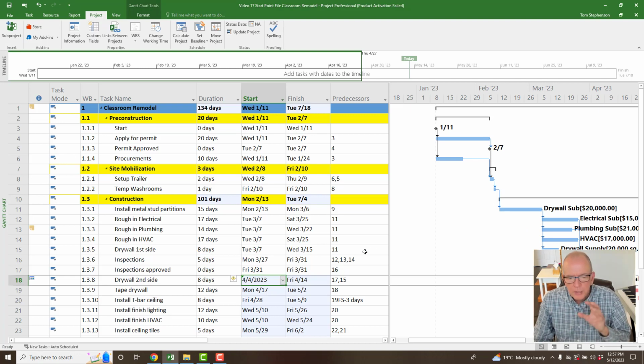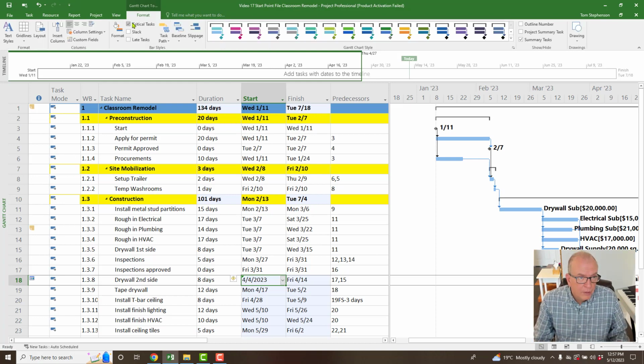I can't tell you how many times clients have problems with that. It's like, where did my critical path go? And of course, you have to turn the critical path on under format, right? So if you don't have it on, that won't show. But it's like, where did it go? And I'll look at the schedule, and one of the first places I look for is constraints. Sometimes I see just one, and it's knocking it out for most of the project. And it's like, oh, okay. Did you need a constraint there? Why did you put a constraint there?